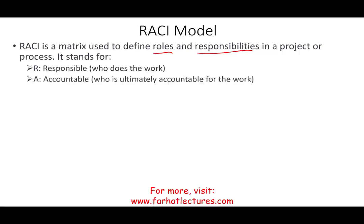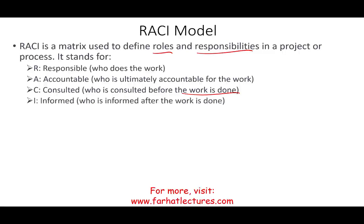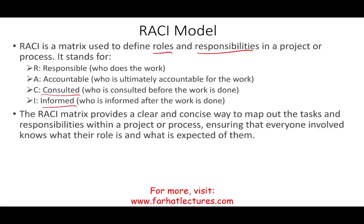A stands for Accountable — who is ultimately accountable for the work? This is where the buck stops; usually it's the owner or manager, the people at the top. C stands for Consulted — who is consulted before the work is done? You might have a team of consultants or one person you consult. And I stands for Informed — who is informed after the work is done? So we need to know who's responsible (doing the work), who's accountable, who's consulted, and who's informed. The RACI matrix provides a clear and concise way to map out tasks and responsibilities within a project or process.